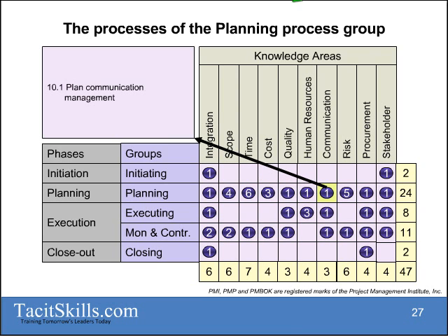Communications, I need a communications management plan. In other words, how am I going to plan and make certain that I can manage the flow of information on my project? In my communication management plan I would have who is allowed to get what information, which reporting will I have, the reports that I'm going to give. I would also have in there how frequent they are, what level of detail, all that type of stuff.